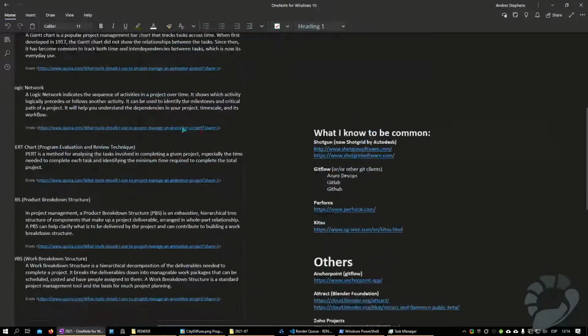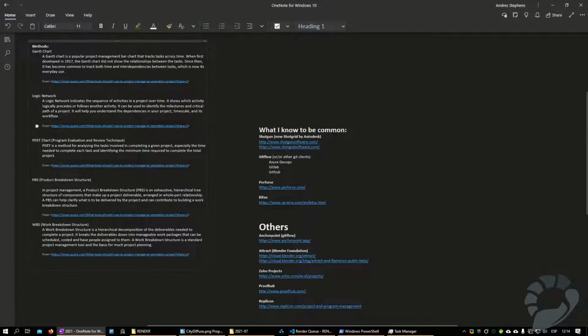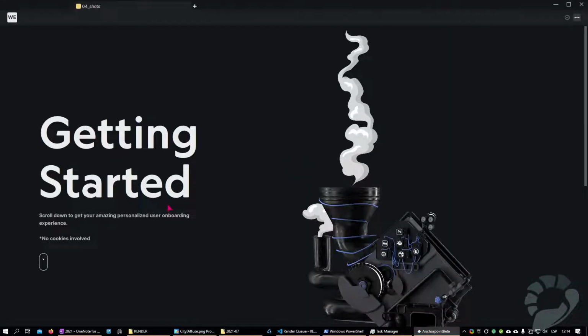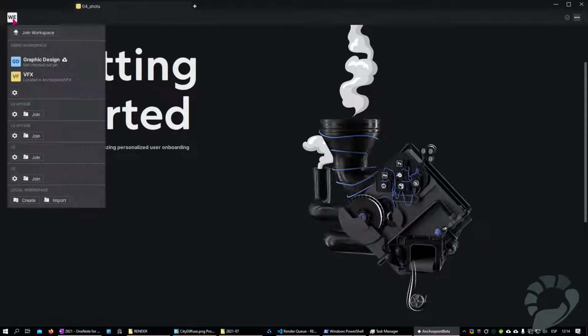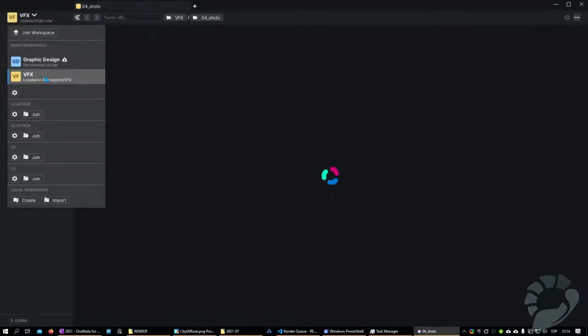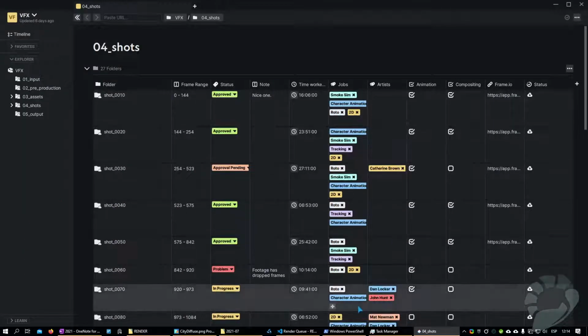Professionally, when you're managing software people, one of the things you want to learn is how accurately a given individual predicts their own workload. And with modern versions of Project, you keep track of estimates versus actuals. So you can start to develop factors like, well, okay, Bill says it's going to take 5 hours, I multiply that by 3 because he's always that slow. Not so important to this project, but managing large software development projects, it was pretty useful. That's good. Yeah, that's true.